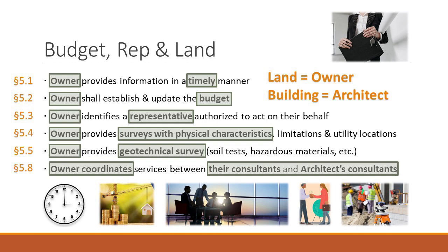Because whatever costs the contractor is going to charge to fix it, to get it to work right, are coming out of the owner's pocket. And the owner wants to have a place to get reimbursed for those costs. So the obligation in this contract is, it's the owner's fault. So when you're contracting with your kitchen designer, you want to make sure you can pass that responsibility down to them.